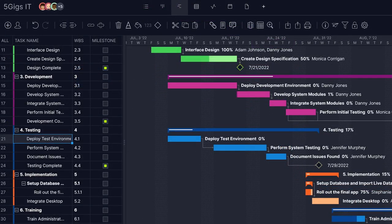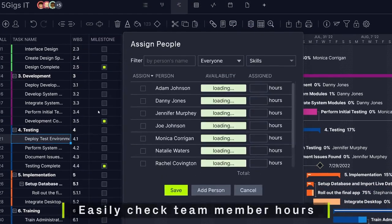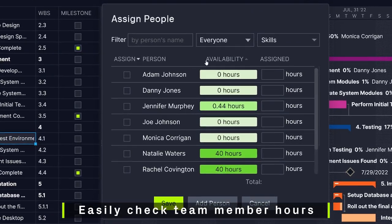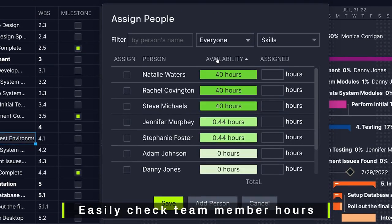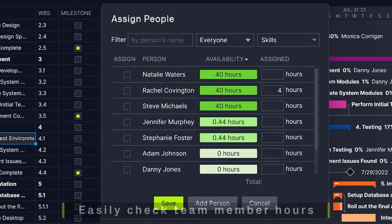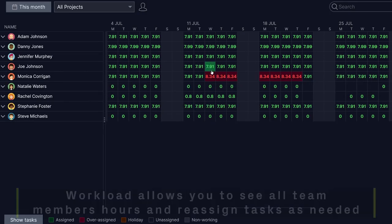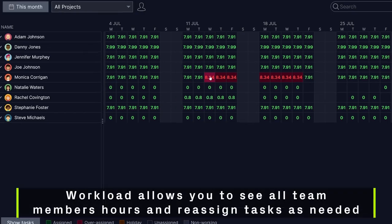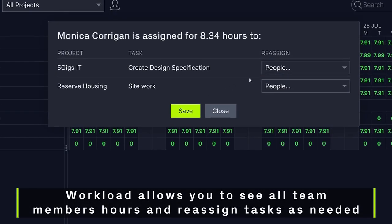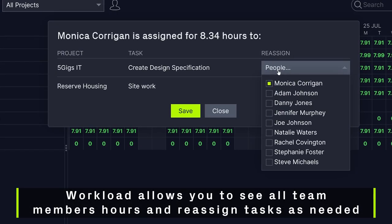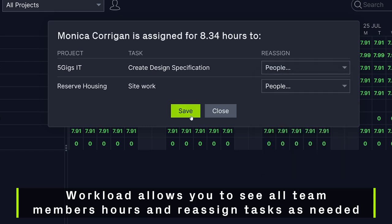When assigning tasks in the Gantt, you can easily check how many hours each team member has available. To go one level deeper, Workload allows you to see all team members' hours and reassign tasks if someone is over or underutilized.